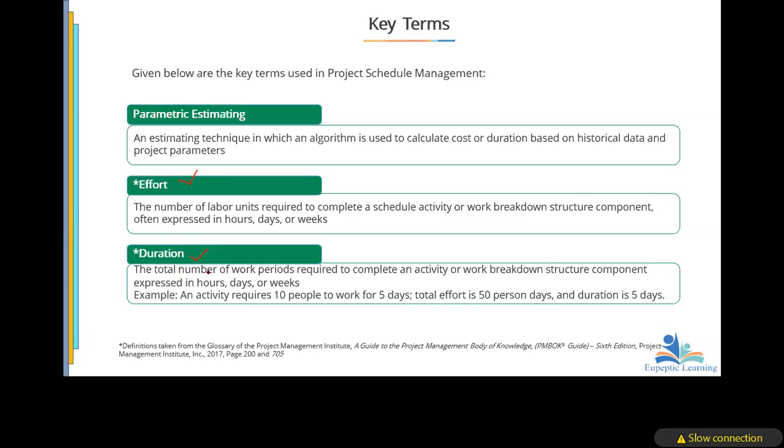Then the duration, we are looking at the work period, how long according to the days. Typically, weekends are not part of the days. Weekends are seen as holidays. So when you pick the Gantt chart, for instance MS Project, it does not allow you to schedule or put somebody on a Saturday. It will not show unless you indicate there that it is overtime before it will allow you.